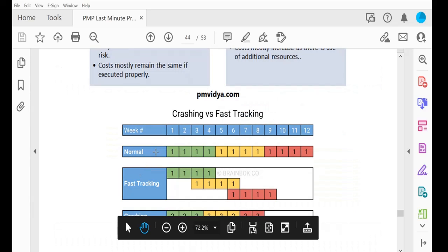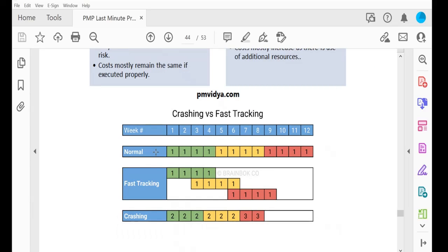They will give you the CPI index and SPI index. One thing to remember is that if the CPI index and SPI index are more than one, it is good health. It indicates your project is in good health. If it is less than one, it indicates that your project is behind budget and behind schedule. Again, if it is greater than one, that means your project is within budget.